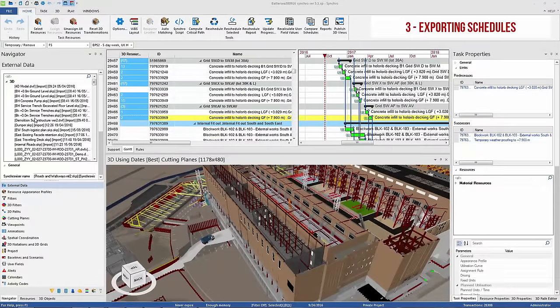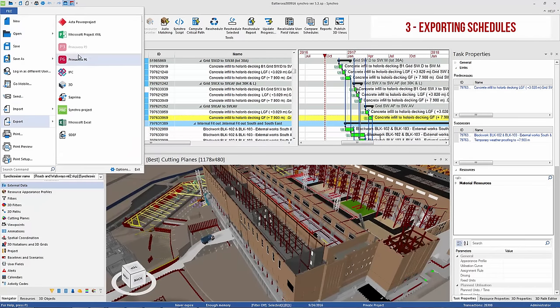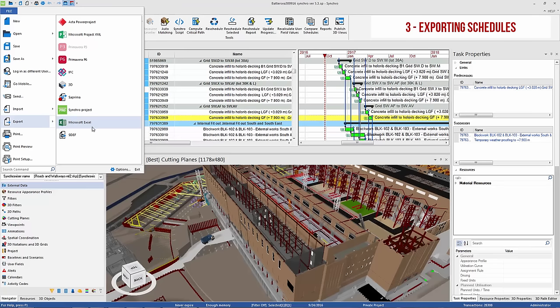If the schedule needs to be exported, Synchro supports exporting to multiple formats including Asta Power Project, Microsoft Project XML, Primavera P6 and P3, IFC, Microsoft Excel, and Standard Data Exchange format.